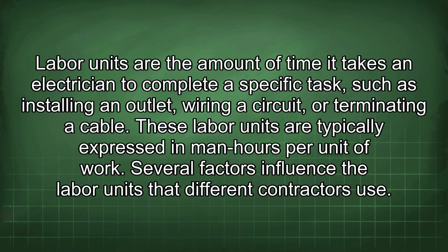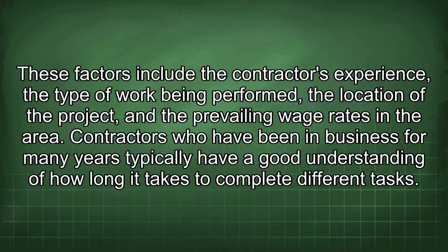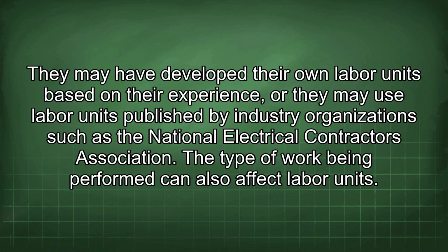Several factors influence the labor units that different contractors use. These factors include the contractor's experience, the type of work being performed, the location of the project, and the prevailing wage rates in the area. Contractors who have been in business for many years typically have a good understanding of how long it takes to complete different tasks. They may have developed their own labor units based on their experience, or they may use labor units published by industry organizations such as the National Electrical Contractors Association.